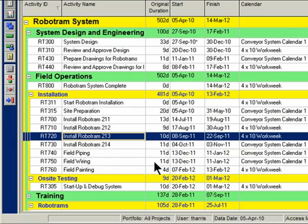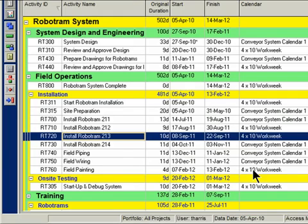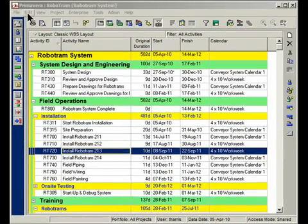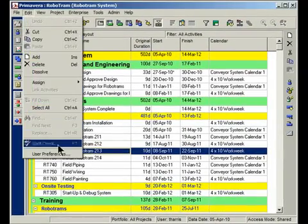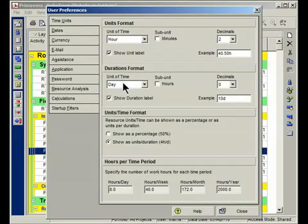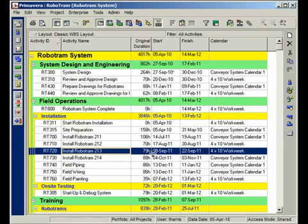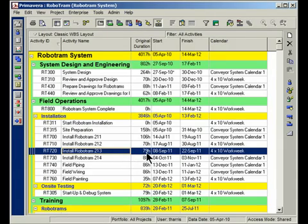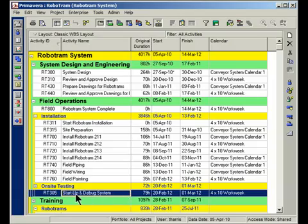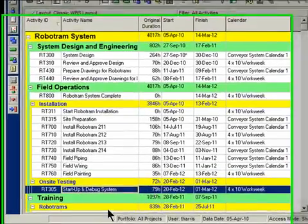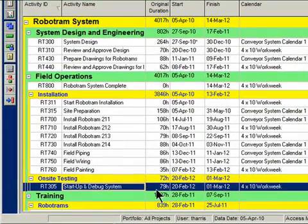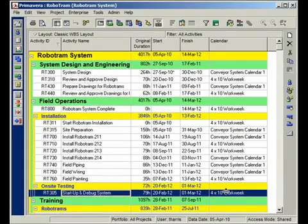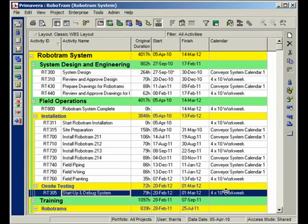Now, just a point here. You're going to notice that there's two activities on screen that have a value of 10 days for original duration, and were changed, and you might be asking, how come those ones were included? Well, the truth is, if we set Primavera to show everything in hours here instead of days, you're going to notice that for this particular activity, it's 79 hours, which is actually one hour short of 10 days. So it actually, in terms of hours, it is less than 10 days. And down here, not this one, but the startup and debug system is less than 10 days as well. And that's why those two were changed. So you need to sometimes look at things in hours, which is how Primavera actually stores those values in the database.